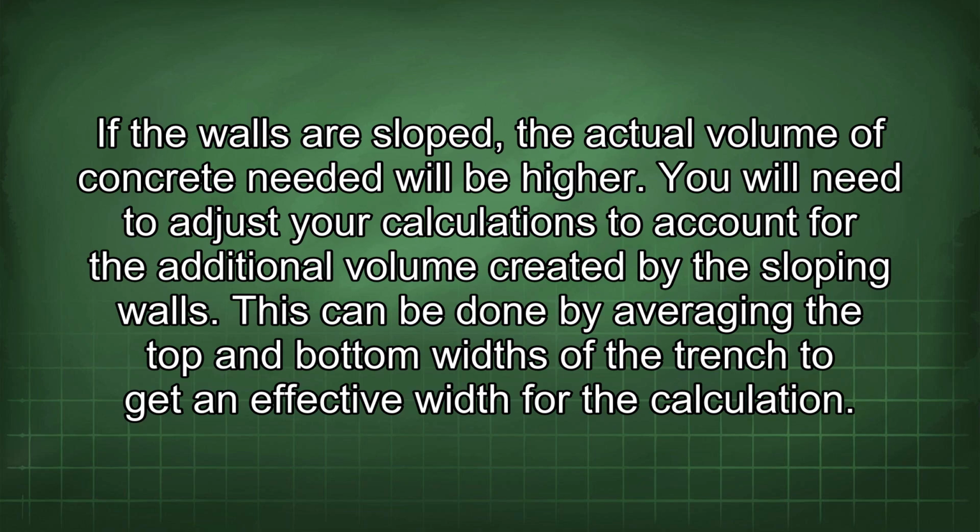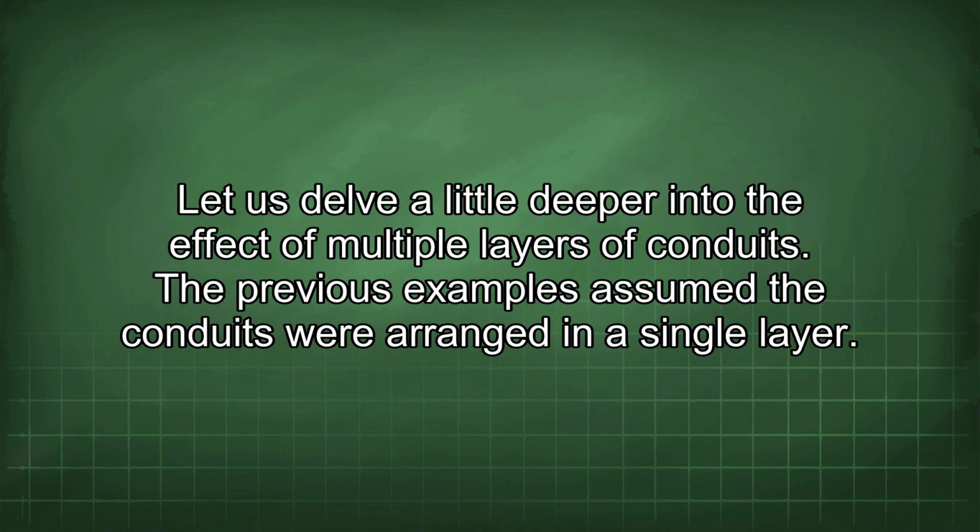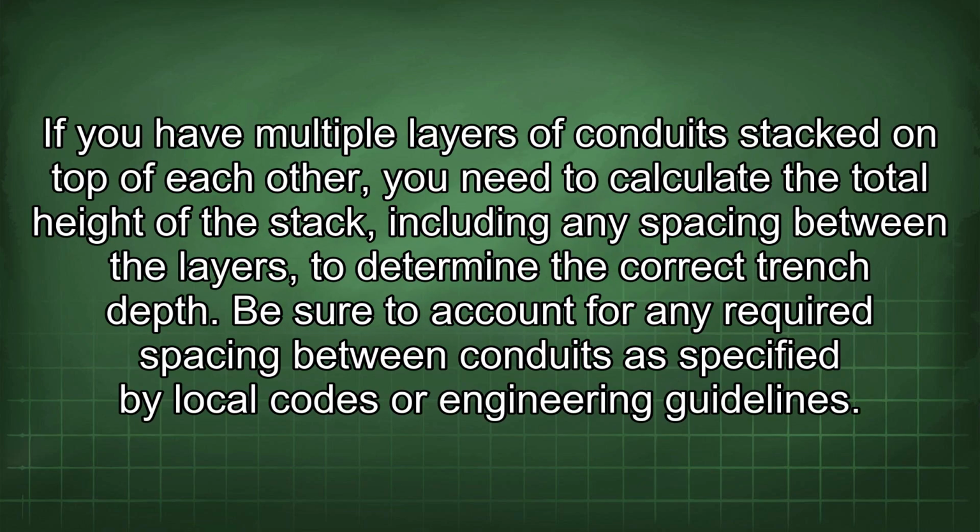Let us delve a little deeper into the effect of multiple layers of conduits. The previous examples assumed the conduits were arranged in a single layer. If you have multiple layers of conduits stacked on top of each other, you need to calculate the total height of the stack, including any spacing between the layers, to determine the correct trench depth. Be sure to account for any required spacing between conduits as specified by local codes or engineering guidelines.